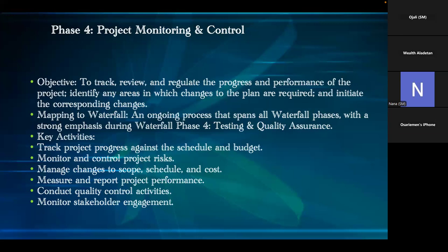Then when you look at a particular story, you can tell who the story is with. Is it with the developers? Is it with the testers? Once the developer is through, he says completed. Then the testers will come and pick up that story and move it to their own column.